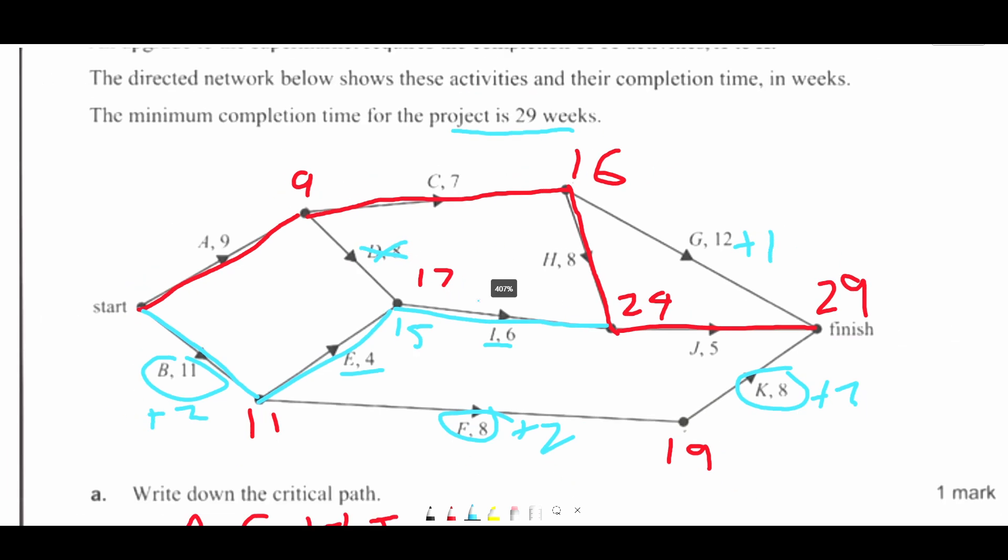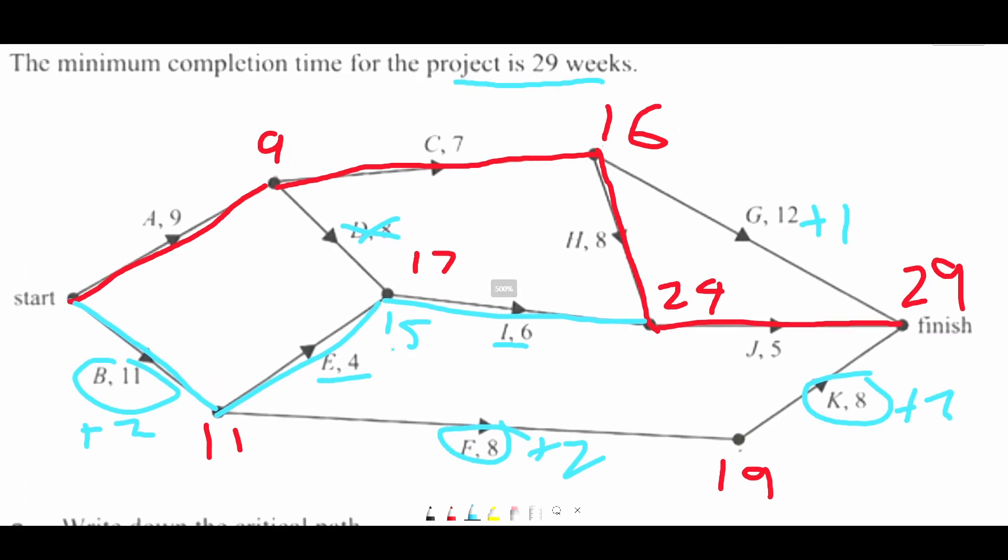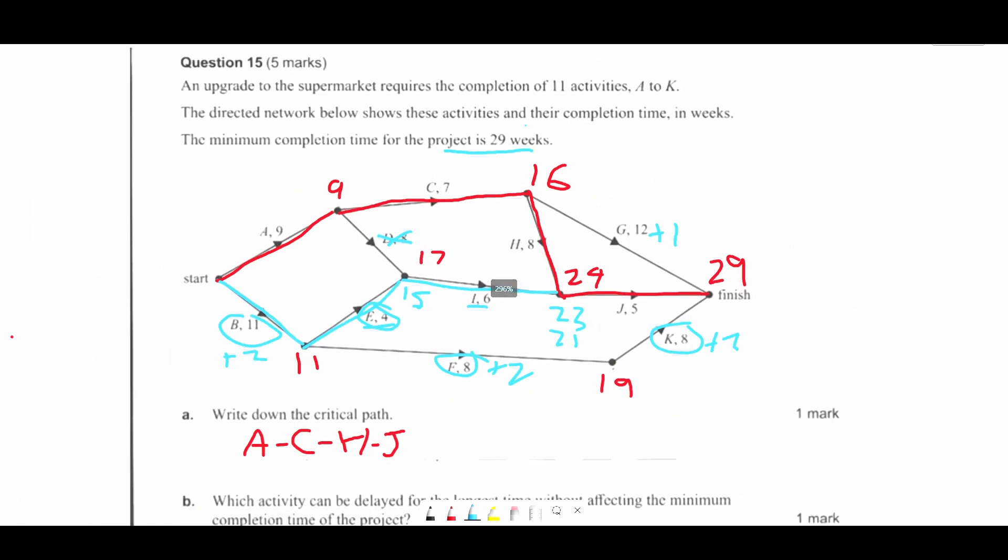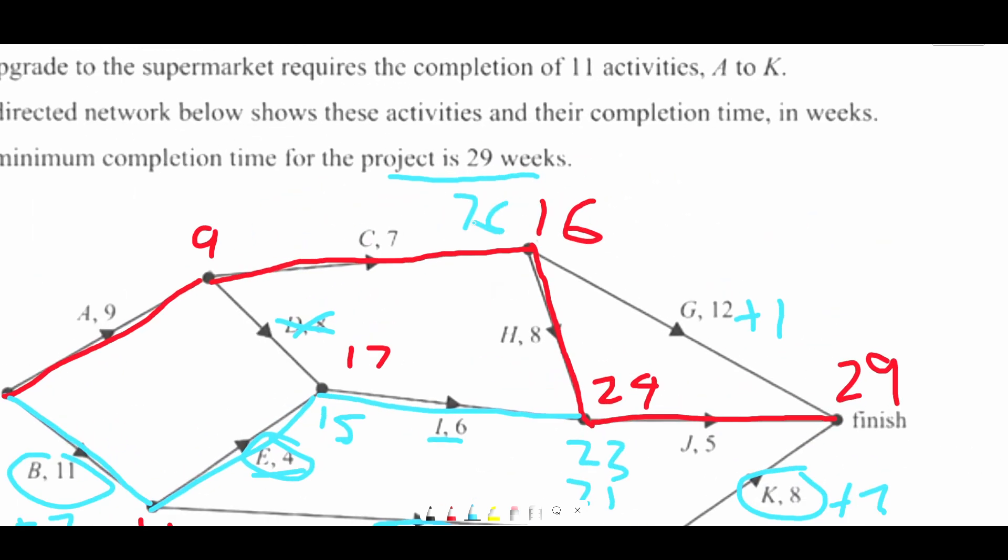So that's shorter than 17. So D is not an activity that can be floated. So 17 plus 6 is 23. But 11 plus 4 is 15. 15 plus 6 is 21. So that means E can be reduced by 3 weeks. Because that will give you a completion time of 26. But we have 29. So that's just E.